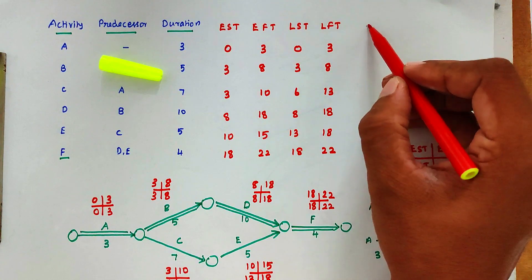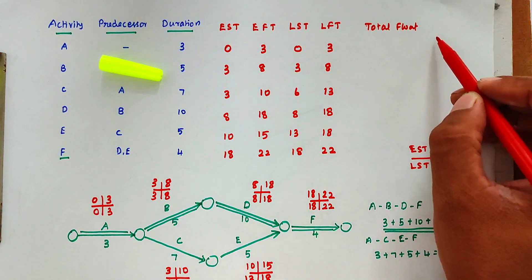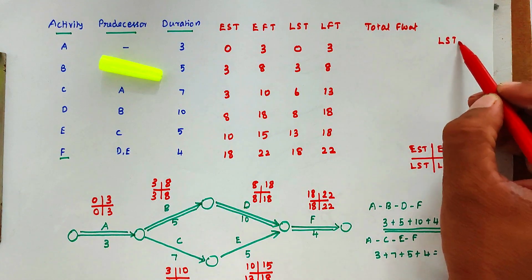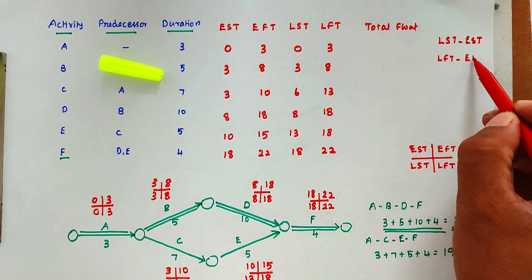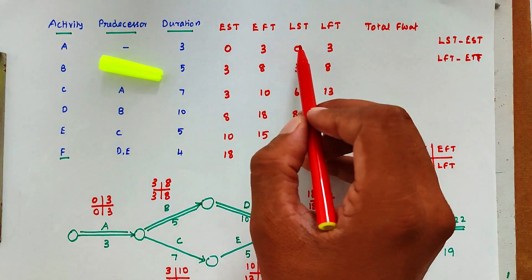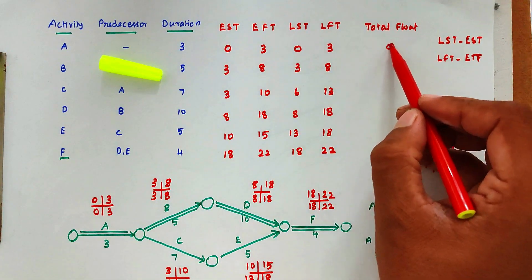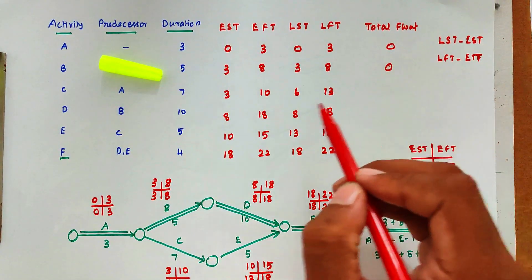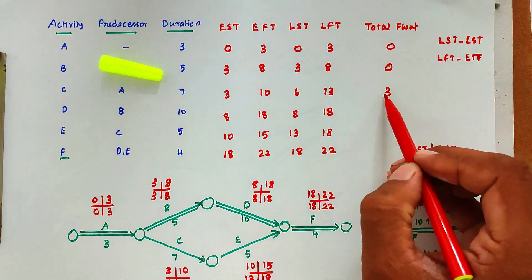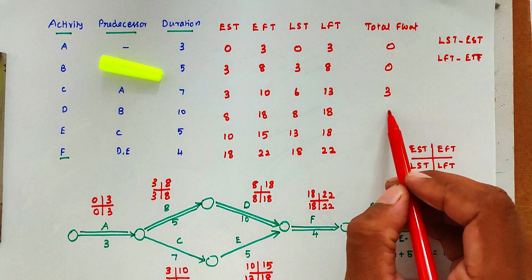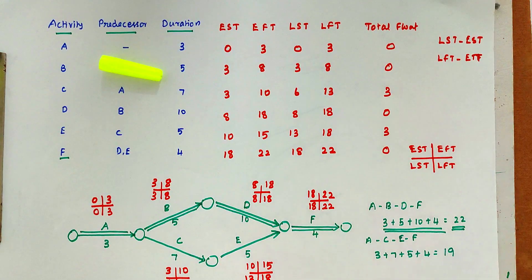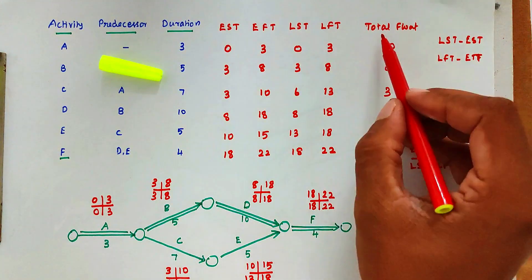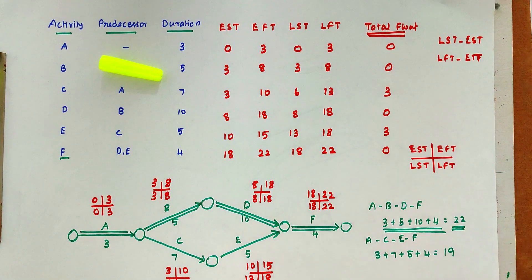Now we find the total float. The formula is: Total Float = LST − EST, or equivalently LFT − EFT. Calculating: A = 0−0 = 0; B = 3−3 = 0; C = 6−3 = 3; D = 8−8 = 0; E = 13−10 = 3; F = 18−18 = 0. These are the total floats for all activities. This is the method to solve the problem. We will see more in the next video. Thank you.